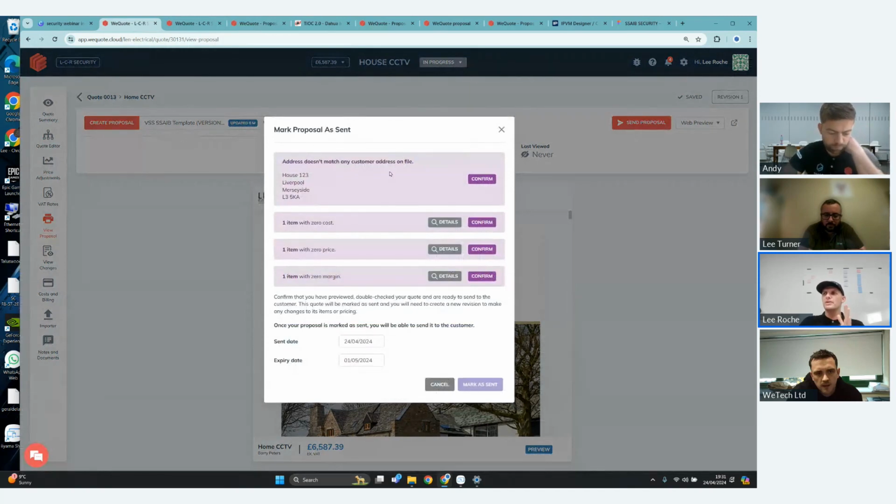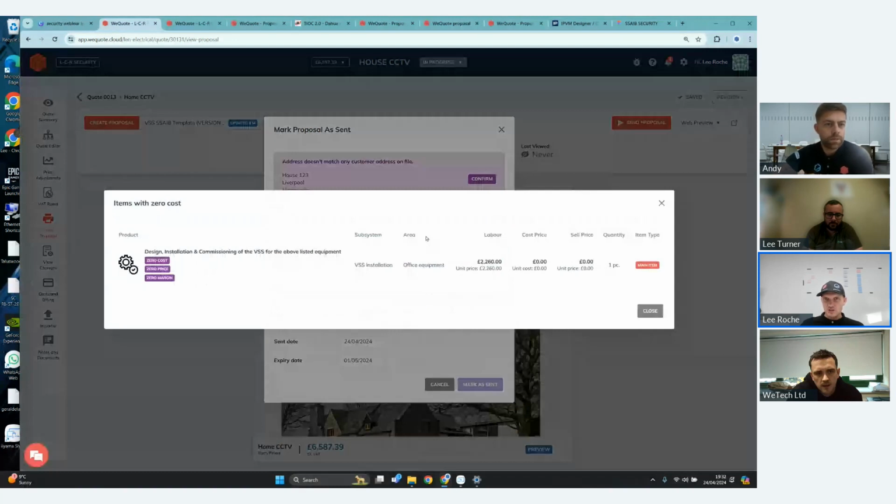So I am always trying to fix if you're going to start off on the wrong foot. And what I mean is I used to send so many quotes out, and then I'd look at it and go, I've sold the camera at cost. I've not priced enough for the camera. I've missed this off. I've missed that off. It's the costs of things or whatever it is. And what we're trying to do is flag it up to you. Maybe there's a mismatch of addresses, 0 item costs. And we're stopping you from sending a quote till you confirm that you're happy with these negative costs. Obviously, because the labor on that one has not got a margin on it.